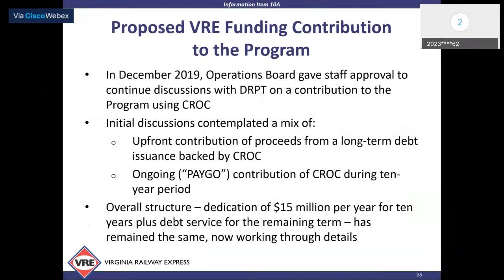Okay, so as part of last year's budget, the board authorized us to continue those discussions with DRPT on making a contribution to the overall program. The concept from the beginning has been a mixture of debt so that we could make a large one-time contribution that can help advance key early components within the program, and then an ongoing PAYGO or cash contribution that would support the design and the construction of the other projects within the program on a longer term basis.